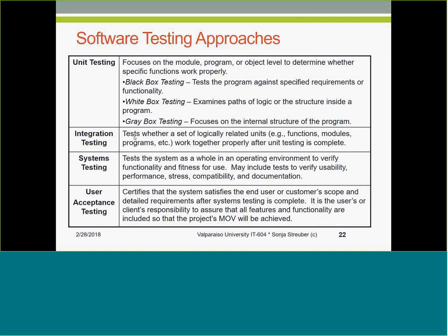So each project in software specifically, but also in hardware, we'll be looking at at least 3, if not 4 levels of testing. The first level, unit testing, is typically performed during peer review, within the software development team, either as black box testing and white box testing, or most often as gray box testing. And this is performed within the software team itself.